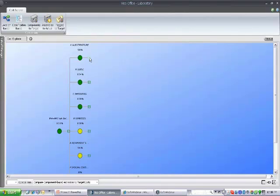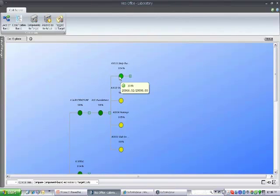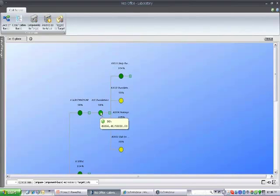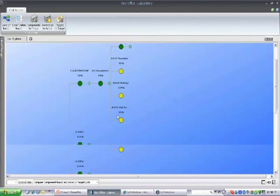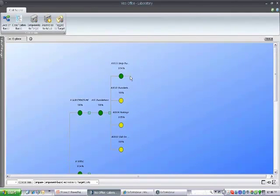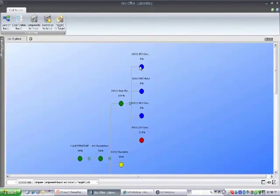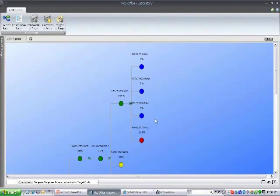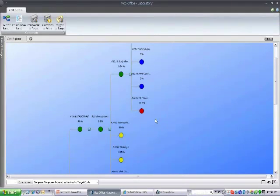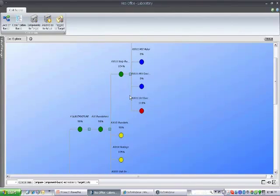And as I further drill down into the estimate itself, you can see that when I'm on target and I'm doing fine, I have these nodes show up with green color. When I'm within a certain range, I have a yellow color. When I'm suspiciously low on certain budgets, I've got a blue color. And when I'm over budget, I have a red color. So I know exactly where I'm over budget.